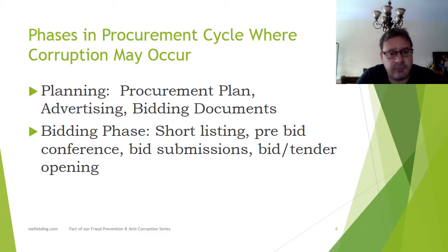So we have this idea of a procurement plan. The controls that you have to have over your procurement plan are that when it is being prepared, we only include in the plan what we know that we actually need. So we don't get this idea of padding. And many organizations will do this. Firstly, there's the idea of let's ask for too much and then we'll be knocked back to what we actually want. And secondly, if you can have unlimited procurement, then let's just go for it and see what we can get this year. It becomes a little bit of a game.